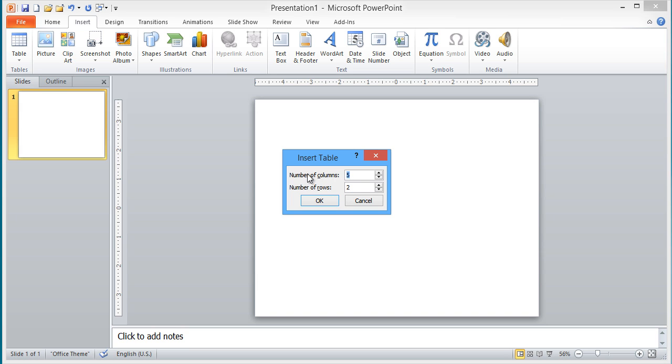Now when you're doing this, the reason for using a table instead of just drawing shapes or rectangles by hand is because you want greater accuracy. In most cases, we're going to be looking at a project that spans a few months. We're going to show each of the tasks by which weeks they occur. So what I would suggest is you would want to have five columns for each month, and then you're going to need one column on the left hand side for the labels. So let's say I'm looking at a three month project. I would have 15 columns for my time and then one additional one for the label.